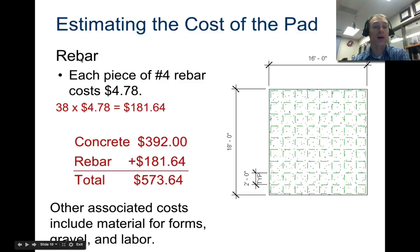We have to figure out the cost for all the rebar. If each piece of number four - number four represents the thickness, the diameter of the rebar - if each piece costs $4.78 and we have 38 of them, then we have a total cost of $181. Plus the concrete gives us $573.64.